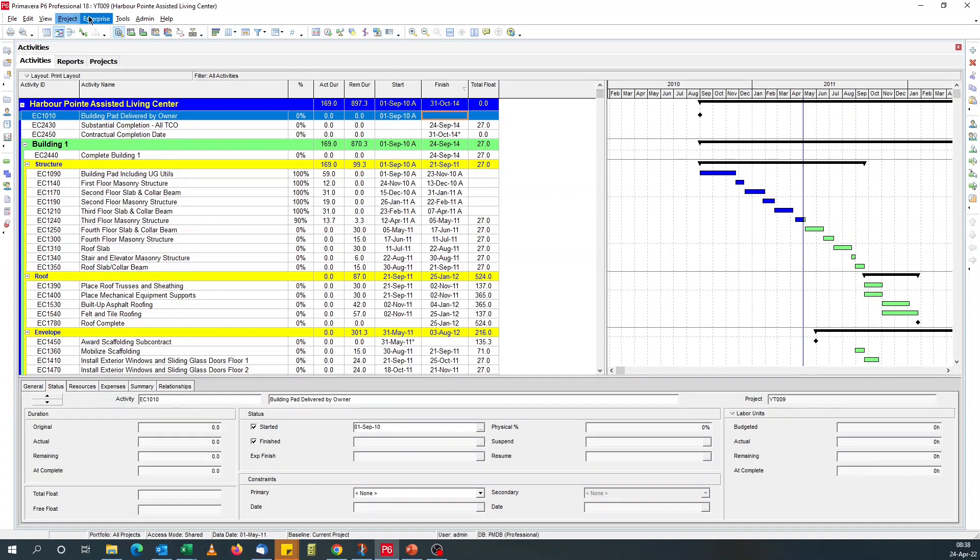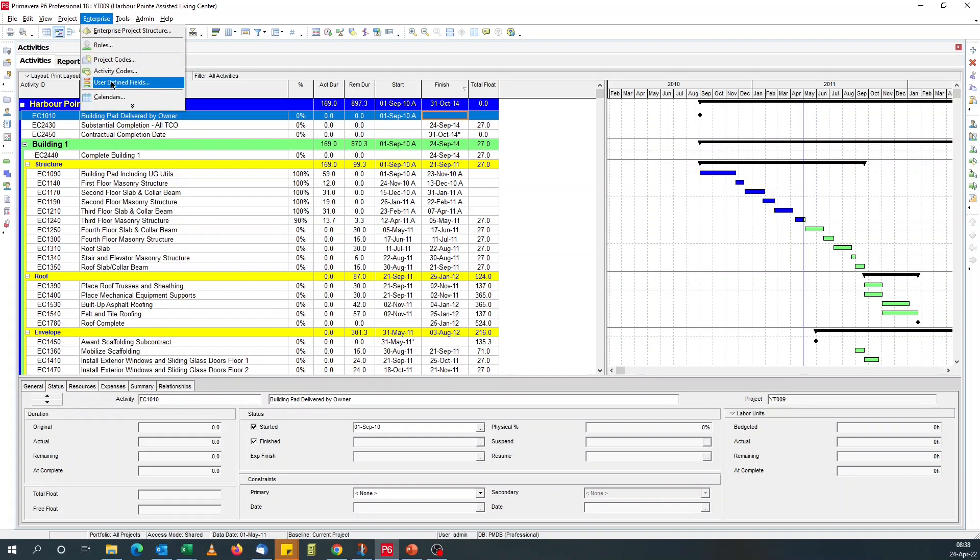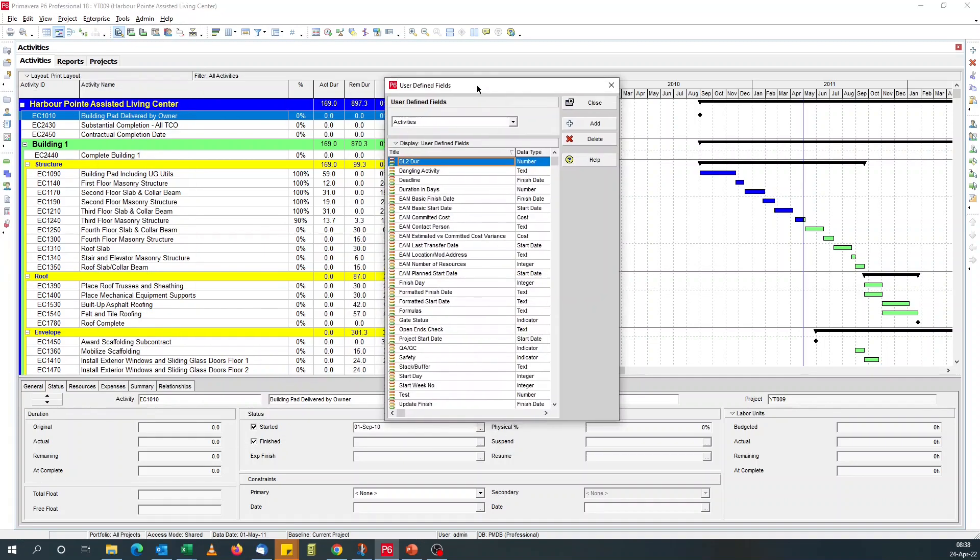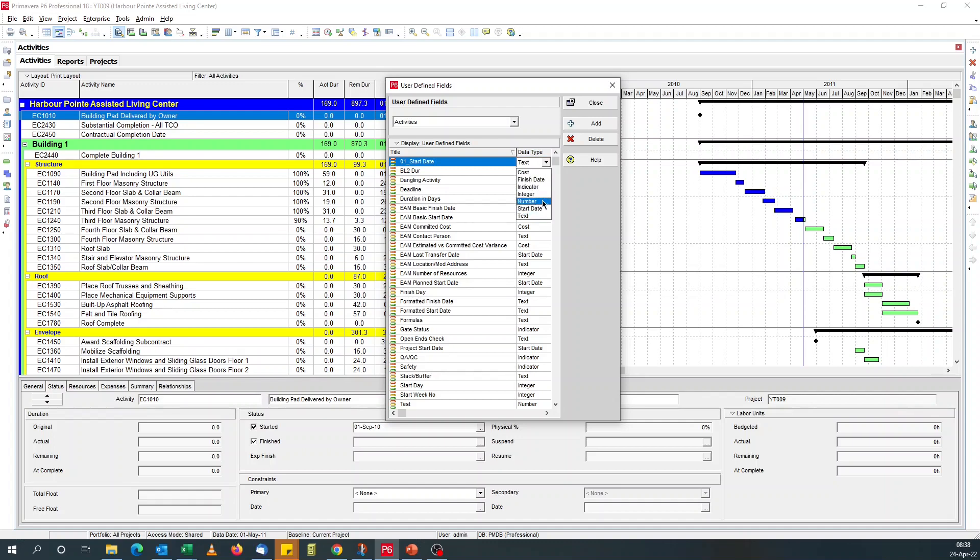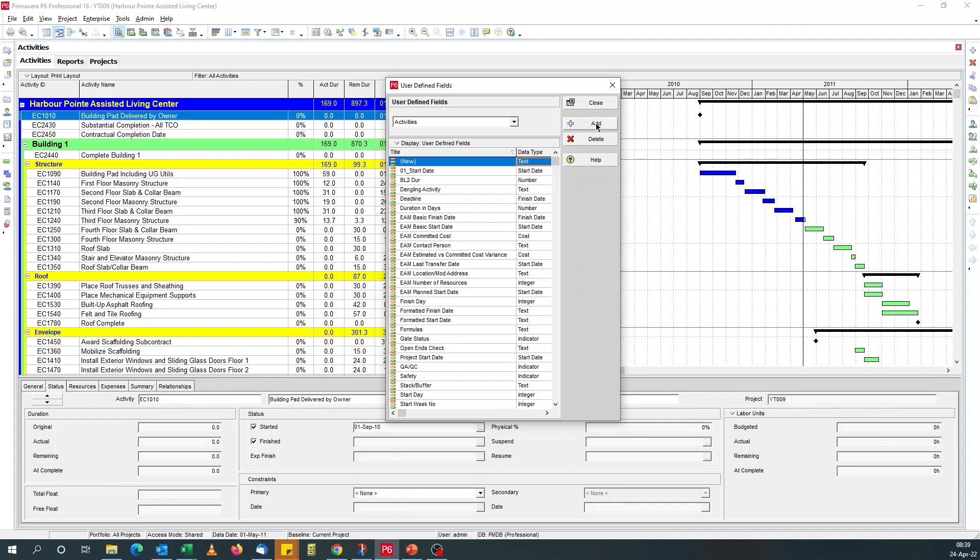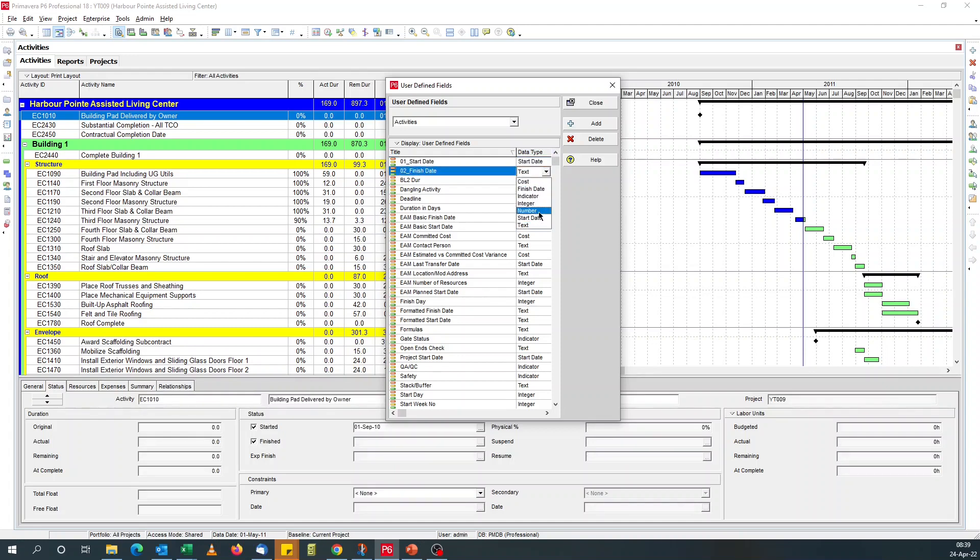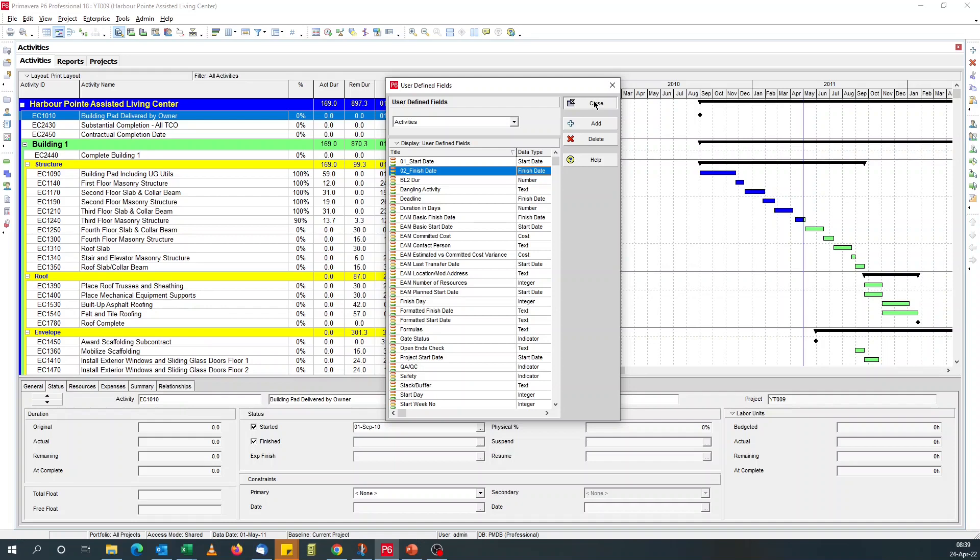So to remove the actuals, we need two user defined fields. So if I go enterprise user defined fields, the first one will be, I like using numbers so that it stays at the top. I'll say 01 start date, change the data type to start date. 01 start date, 02 finish date, change the data type to finish date.